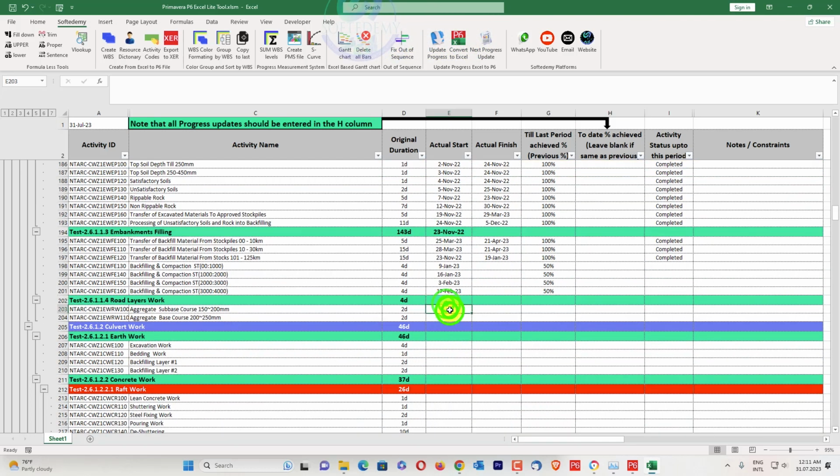This activity started on 3 July 2023, and now we can add, like, 40% of this one. If this activity is 50% done, we can add 25% more, and if we add 25% more, you can see minus 25%. Why has it been written? Because we need to add cumulative. So we have to add 75%. So this week 25% has been done. So don't make this mistake.